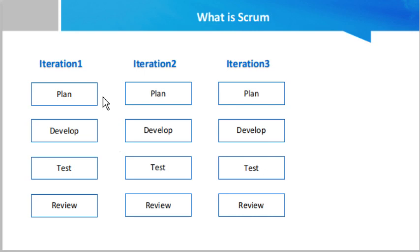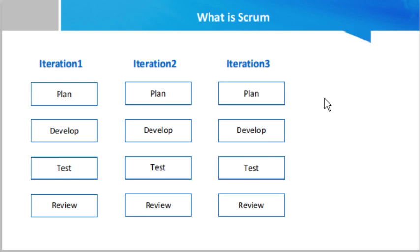In the Scrum approach, every month you are getting customer feedback on how things are going. Based on their feedback, every next iteration is better than the previous one. Once you finish an iteration, you review it with the customer, get their feedback, and make necessary corrections or improvements. When all iterations are complete, you have a finished product that is much better because you incorporated market and customer feedback.